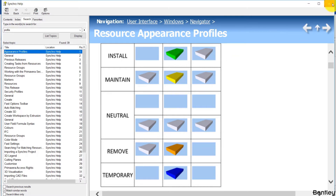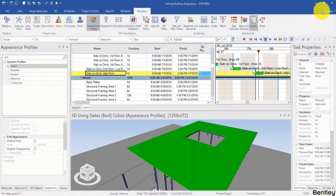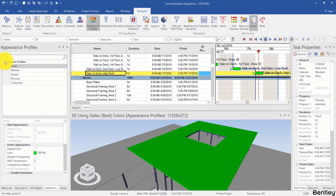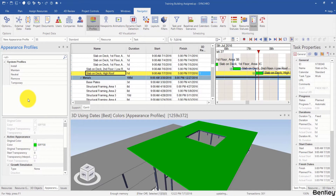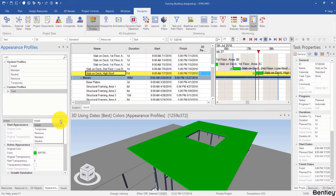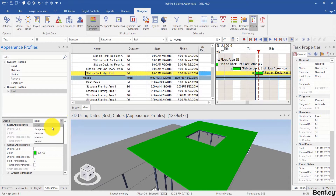Now let's go back to the Appearance Profiles panel. We have five system profiles listed here, and we can choose to collapse or expand the system profiles. I will right-click in the blank and create my own profile and call it 'test'. I can use different profiles as its basic action. If it is based on Install, I cannot change the start appearance — it is not editable — but I can change the active appearance and end appearance.